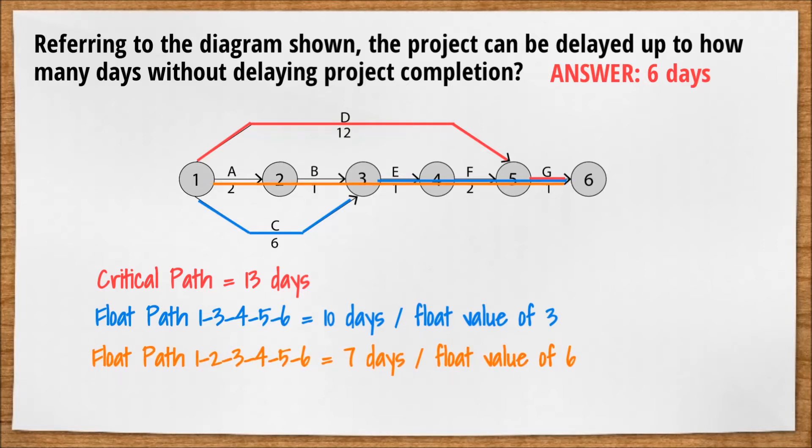Path 1, 2, 3, 4, 5, 6 would take 7 days, giving it a float value of 6, since 13 minus 7 is 6.